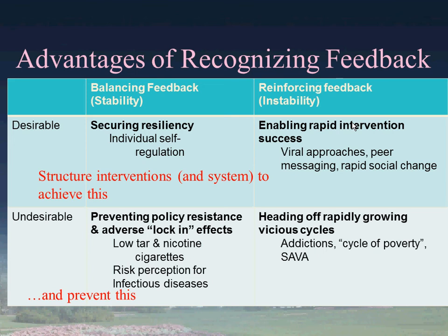And so fires start to come up, and you're always dealing with these fires, so you don't have time to do risk management. And now you're locked into this situation where risk management is not done. Maybe, because of the constant distraction from customer complaints, you're not able to really produce code effectively. The code base is suffering. And you can get situations where you've been locked into a new regime, as we say. We'll see that mathematically, or in terms of some of the intuition, when we look at some of the systems that we're dealing with. So this lock-in effect can be quite pronounced.